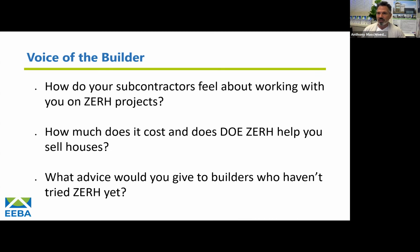As far as lessons learned, once we did it once, it became part of our standard construction process. We've tried different levels of fluid applied membranes, and some of them meet passive house level, and they're 5 times more expensive. We've tried them all, but the one that we started with, which is the most cost-effective one, we've done net zero energy homes, we've done passive homes with it, and every single home that we get gets the same product. So, it's a standard for us, and it's part of what we do.